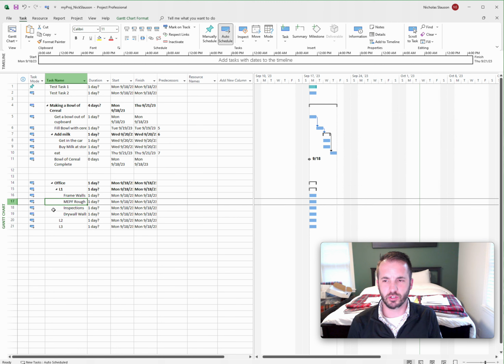When you're doing that, you're creating a work breakdown structure for the project. So your office being the highest level of the project, and then your level 1 is the first area you're defining, then you're defining the tasks underneath it. Microsoft Project supports that very well.